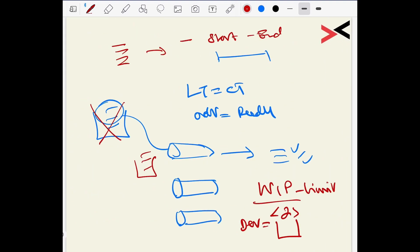The velocity tells you overall how they have managed to do in the past sprint. So you can get a metric across three or four previous sprints and find out what they managed to do and get the velocity. So that you can cut out the cake in terms of how many story points it can complete and then work out a Gantt chart style number of sprints to give you the timelines. But the whole idea behind lead time and the cycle time is that it's all about the efficiencies.